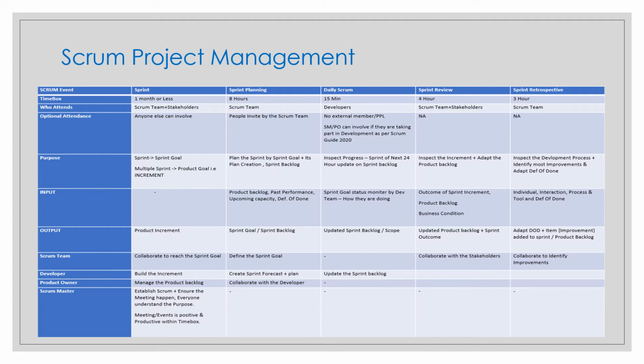This means that items are small enough to fit within the sprint, detailed enough and immediately actionable, so that the developers can start working on them right away. In other words, you can say that a product backlog item is ready when the Scrum team agrees it can be done. Whenever they say it can be done, it gets into the ready state. So always remember that the product owner is accountable for defining the product goal and managing the product backlog.